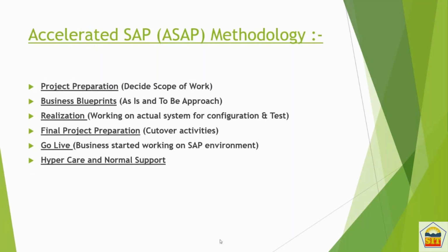The consultant will fix that issue, and make sure that they are able to complete their business activity in the SAP environment. So this hypercare, this support, is going to be for the next 1 month or 2 months. After things get streamlined, there would be normal support which is going to continue for the next 1, 2, 3, 4, 5 years. Again, it is subject to the agreement or the contract we have with the client.